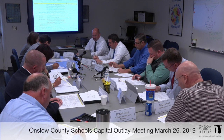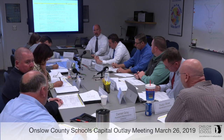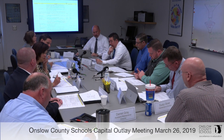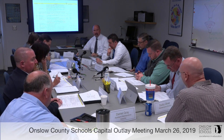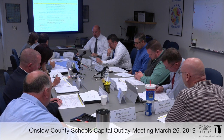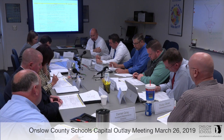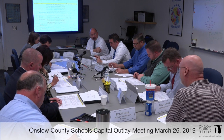Okay, gravel or paving on access road. We're already working on that. Put new gravel out there? We're trying to clean out the swales on the backside, too, to help with the water. So we're currently working on that. I think it's in a lot better condition than it was. We probably need to get a civil engineer involved to look at that whole property from the high school to the middle school, and possibly get the city involved. It's lowland in that area. We all know that. So we do have drainage issues periodically. Okay, so just make that maintenance, what we can do, or do we have funds to get the civil engineer involved? Well, I think for this one, it looks like we gravel the road, and then you're doing the swales right now. We'll take a look at it as needed after that.